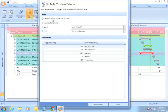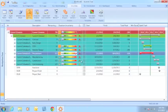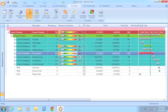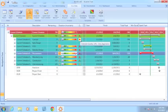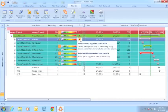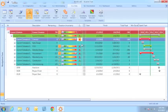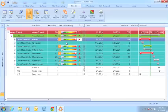Let's do an example using schedule quality. You can see here in the recommendations column that the risk advisor has gone through each activity and made a recommended uncertainty assignment. Looking at the color, I can see here that it has recommended that my concept group of activities be flagged as very aggressive. I can assign that summary to all of the children activity.